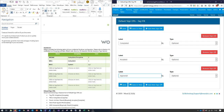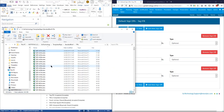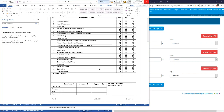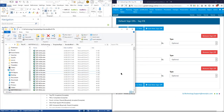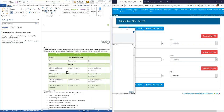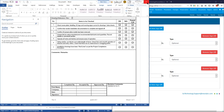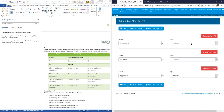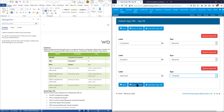To restate the reason why it's completed, accepted, and approved: in our actual ITR documents — our actual checklists — if we open a random one you can see completed, accepted, approved. If we choose another one, say D17B, open that — completed, accepted, approved. Because it's kind of standard and pretty much all of them use that, we want to set these up as the defaults. Completed is a required field — someone has to confirm it's been completed. Accepted is also required, but without it the item isn't properly complete: it doesn't add to the graph or the report as completed. All three are required, required, and then complete — and you can only ever have one sign-off which is 'complete'. Save and view.